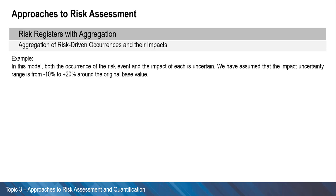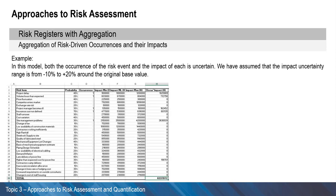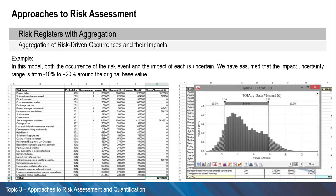Let's take a look at an example of such a model. In this model, both the occurrence of the risk event and the impact of each is uncertain. We have assumed that the impact uncertainty range is from negative 10% to positive 20% around the original base value. The figure on the left shows one sample of this model, and the figure on the right shows the distributions of outcomes after generating 10,000 such samples. This approach more accurately reflects the underlying nature of the situation, as it captures many scenarios, all of which can occur, and one can assess the range of possible outcomes, not just average values.